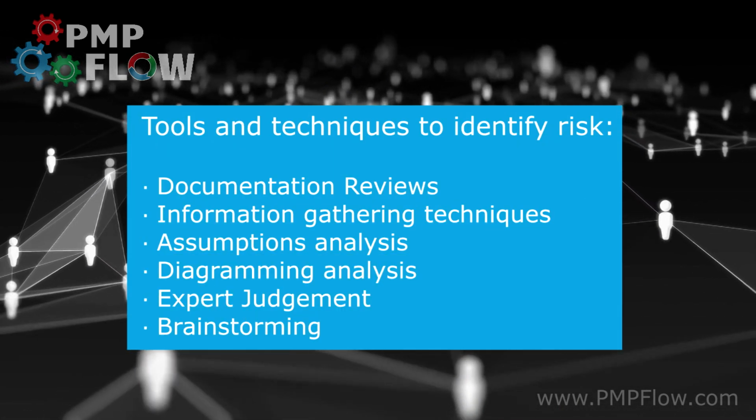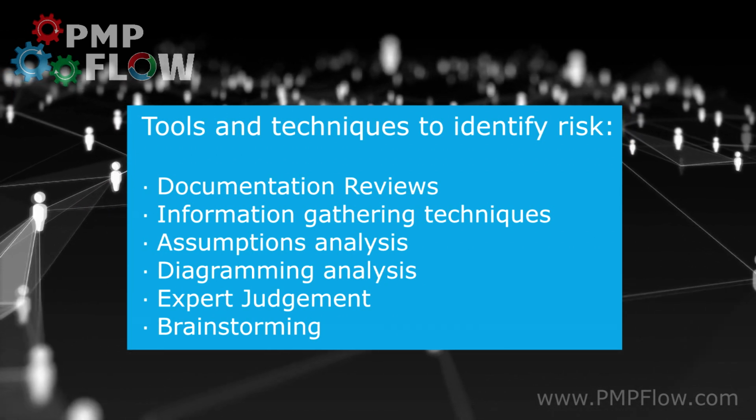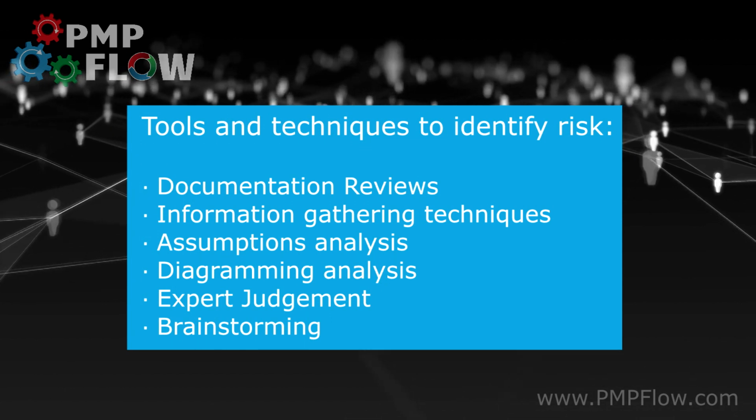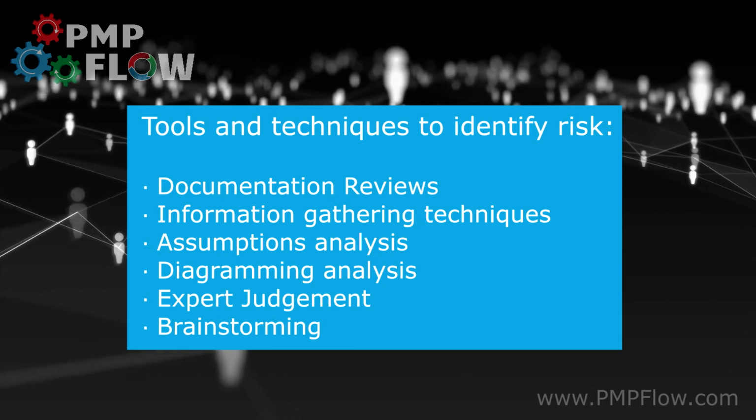Information gathering techniques, like pre-scope discoveries. Assumption analysis. Diagramming analysis, like cause and effect diagrams. Expert judgment, like subject matter experts. Brainstorming, like team collaboration. Once you identify the risks, you can update them in your project management plan, which must be created before the project kicks off.